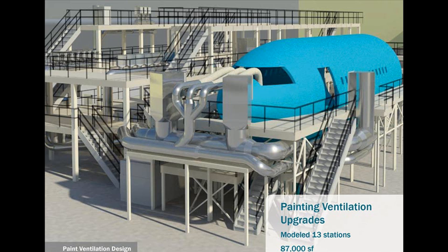So we decided in our office, because if Boeing's not building airplanes, they're not making money, so they can't afford to have downtime during construction or change orders or anything going on during construction that says, oh, well, you guys are routing a duct here, but we can't put it here. So we just made the choice in our office that we're going to as-built every existing structure that we touched on these 13 different planes. So we did 13 of these stations.